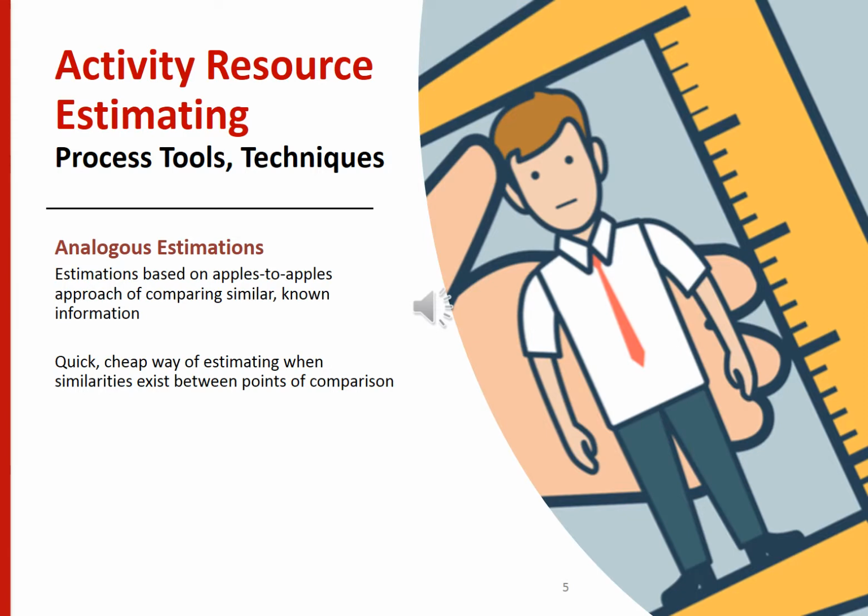Obviously, the restaurant video is more in line with your current project. Even better, the previous video for the new restaurant was also roughly 90 seconds long, which helps with comparison. When you're done looking at the past project, you realize that the total cost for the video that was created 6 months ago was $2,000. So you can estimate the cost to create your current video will be slightly higher due to the 6-month time window.